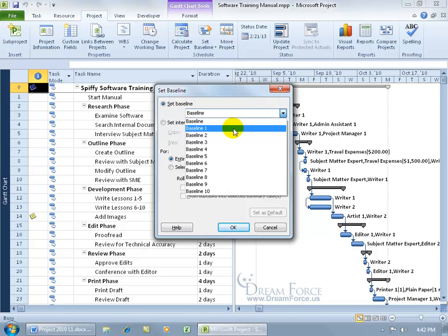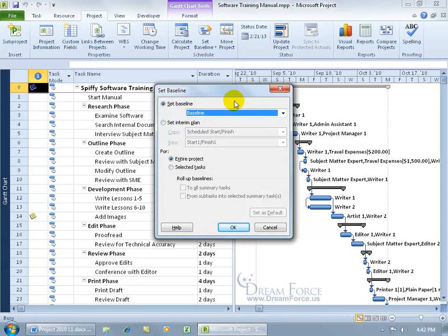Maybe throughout the project you can go ahead and take additional snapshots and get a little bit more detail at what point you actually jumped up, or maybe it wasn't at a particular point but incrementally. Still, when you take all these many snapshots here or baselines, you set them, you can say at baseline 5 we increased by 2,000, then at this point in the project or halfway through baseline 6, wow, that's where we took off. Instead of going from the original plan all the way to when the project completes, you can break them up here. So to keep it simple, let's just go ahead and take a snapshot or set the baseline for the original project here, the plan, and just go ahead and click OK.